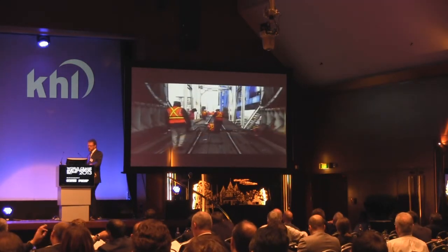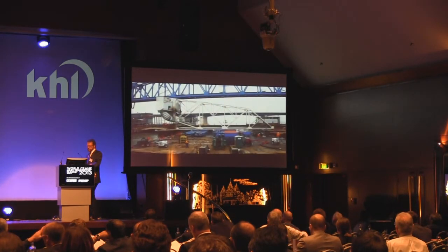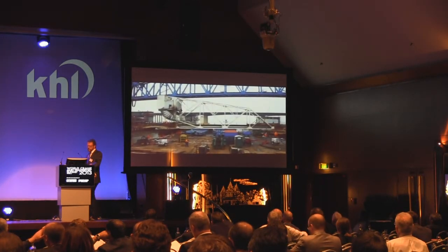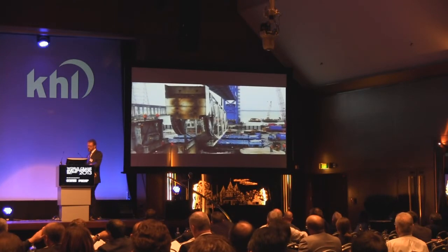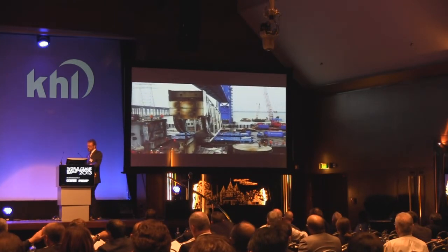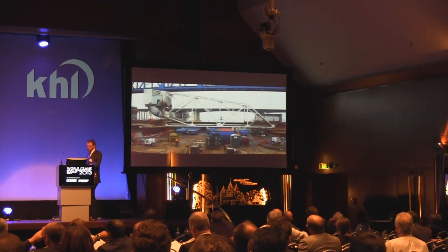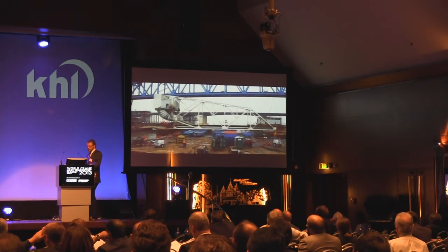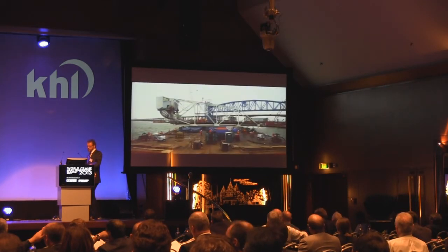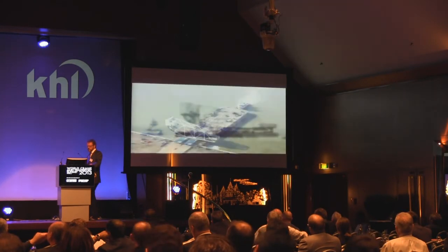Once the barge was positioned under the bridge, the last of the counterweights were relocated under Burkhalter's direction, and Burkhalter began ballasting the barge to lift the 1.7 million pound bridge from its supports. Continual ballasting allowed crews to move the 56-foot tall Basque Bridge underneath the raised lift span to complete its removal from the site. The barge traveled the same route via GPS points back to the dock.